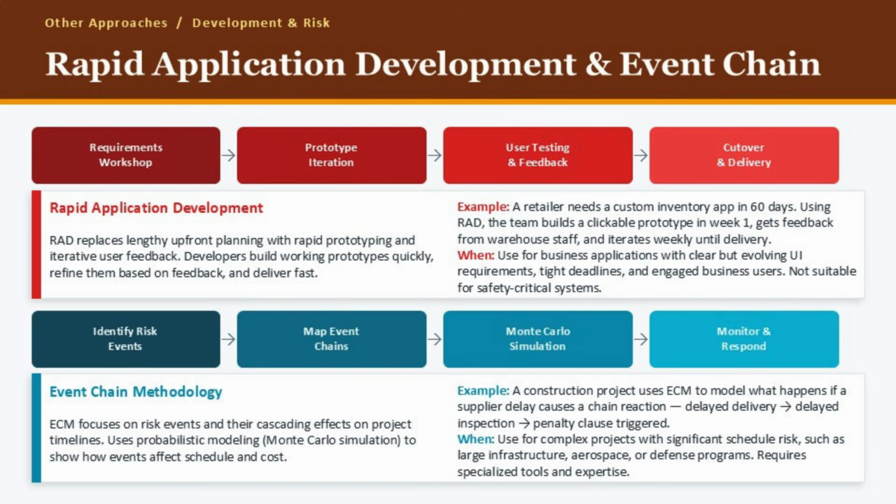RAD works brilliantly for business applications with clear functional goals and engaged users. It should not be used for safety-critical systems like medical devices or aviation software, where comprehensive upfront specification is mandatory.